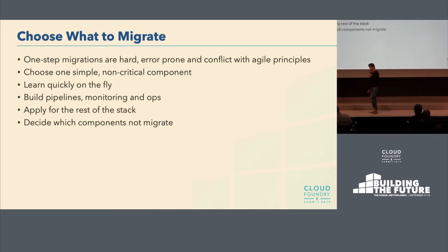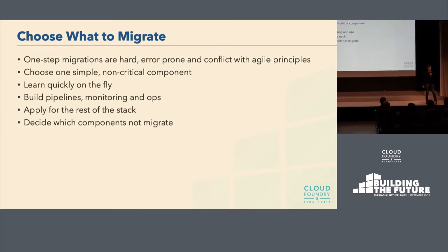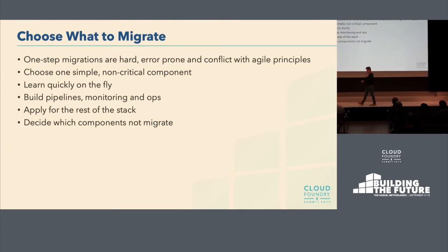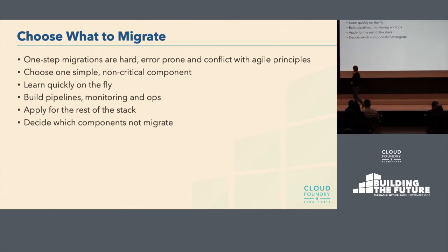Another thing to consider is that there might be some components or even whole applications that you do not want to migrate at all. So an example might be an application which is very difficult to migrate because it will require a lot of changes. We will see later which changes you might need to do. But also the lifespan of the application. So if you have an application which is quite complex to migrate and it's going to be retired in 1 year, maybe it isn't worth the effort of migrating it.